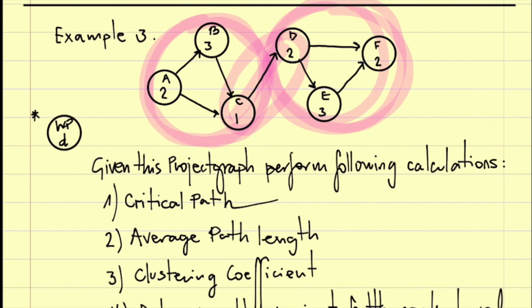We don't want them to be dependent on each other. How do we do it in real life? With inventory. We buy some inventory to the factory so that we don't depend on the supplier, on the purchasing of more.